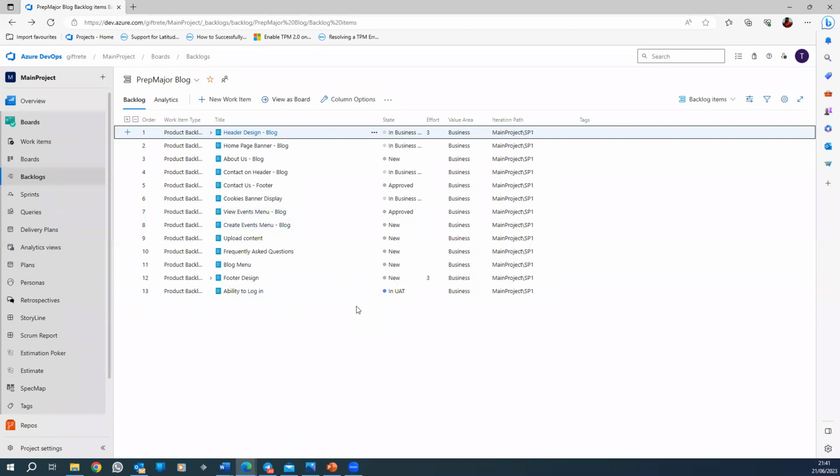Most people just use given-when-then, but it depends on the kind of project, because not every project can come in that format. A good example is that the project I just finished working on used given-when-then, but I just started a new project on Monday, and they don't use given-when-then. They just use statements: this should have happened, this will be completed, that should be done.